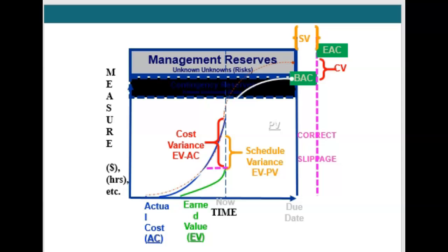And so don't forget, you're comparing your actual cost in blue to the earned value, or the work that's been accomplished in your project. And you're trying to stay on that white line, which is your budget, your planned budget at completion. If you go over or under, you'll end up at EAC. EAC is one of those forecasted status reports that I mentioned. That's estimate at completion. You see where it's a little higher than the budget at completion. So there's a problem there that you'll want to address and stakeholders will want to know about.